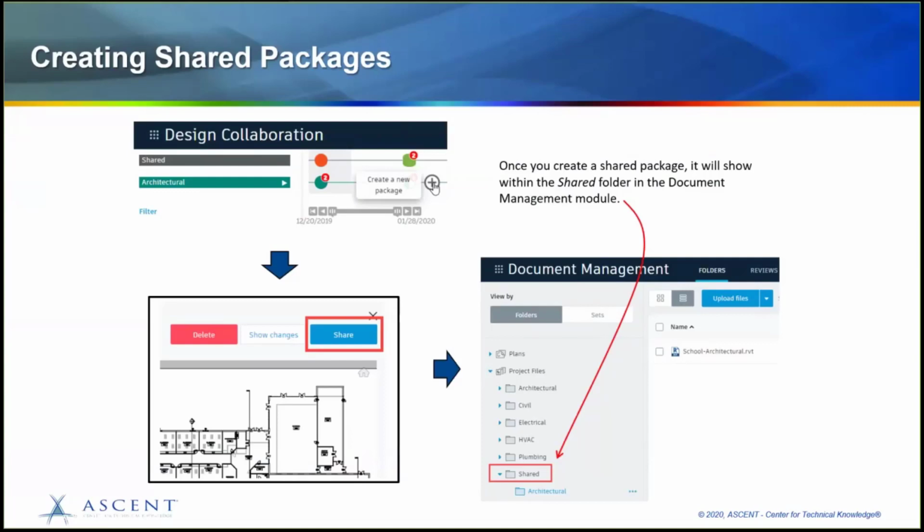The purpose of creating a shared package is our design at this stage in the cycle has been updated enough that it is worth sharing to the other team members, like walls getting moved or structural elements that are added or moved. I need to communicate these changes to, let's say, the electrical team who would be impacted by walls moving or changing or being removed completely.